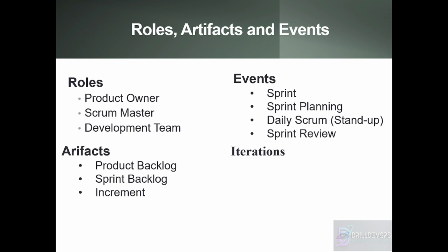It is done by the Scrum Master or DevOps manager or development manager. So he will go to the product owner or the stakeholder and tell what they have achieved. If it is an MNC and you are working for a client, at that time the stakeholder would be that client, and our manager or lead will present the Scrum board and tell these are all completed, these are all pending, these are all in progress. So that is what happens in the sprint review.